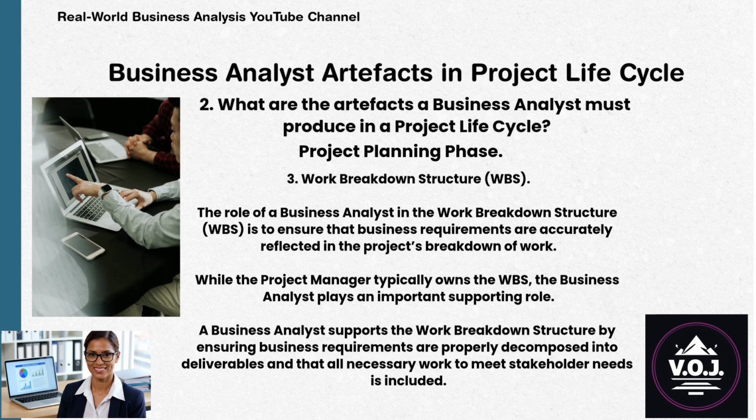While the project manager typically owns the WBS, the business analyst plays an important supporting role. A business analyst supports the work breakdown structure by ensuring business requirements are properly decomposed into deliverables, and that all necessary work to meet stakeholder needs is included.